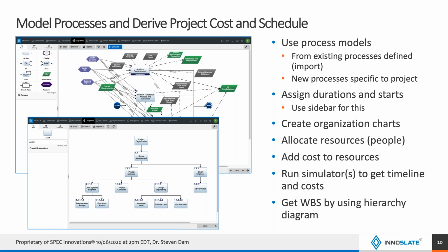And if you put variability in there when you make these estimates, you can run the Monte Carlo, which gives you a kind of a feeling about your cost and schedule risk. So that's another thing you can do. Again, all within the same tool. You don't have to go outside to it. You don't have to have any plugins or anything extra special. It's all right there for you.